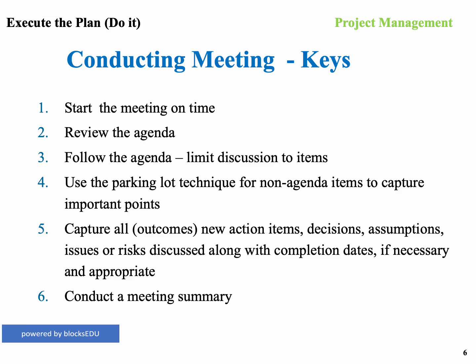The second step is actually conducting the meeting. Make sure you start the meeting on time. Review the agenda, but don't make additions to it or changes to it. Follow the agenda, limit discussions in time. Use the parking lot technique.